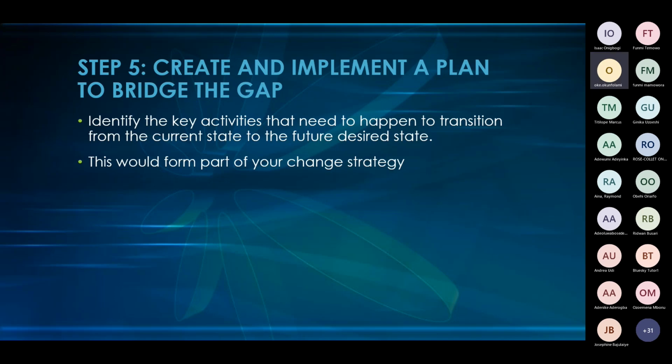Remember, you have epics, your features, your user stories, also known as product backlog items on your Azure board. So those might form part of your epics, like, we need to automate the whole system. And then you break it down to say, in order to automate it, we need this and that. And then you break those features down into user stories. So you see how your gap analysis can be very important in your discovery phase, identifying the problems and how to go about solving them. So coming up with solutions.